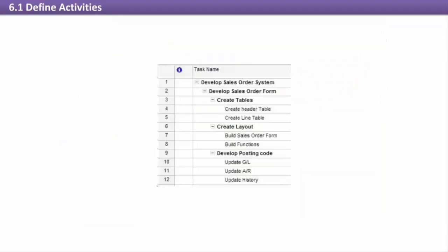To identify activities, work packages are evaluated for how they can be broken down into manageable activities. An adequate level of activity decomposition is generally reached when the activities are assignable to one person, can have a level of effort determined for them, can have their resource needs estimated, can have their expected costs reasonably established, and can have their progress determined and tracked.